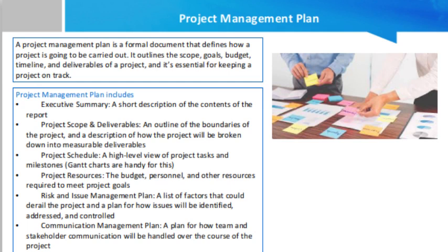According to the Project Management Institute, it should answer all of the questions like: what is to be done, when will it occur, how much will it cost, who will do it, what products or services will be delivered as a result of the effort, what is the responsibility of both the developer and the user, who is responsible for accepting the product as completed, what determines task completion, what mechanics will be employed to deal with changes formally, and how will actual progress be measured. So, these are very important questions here.